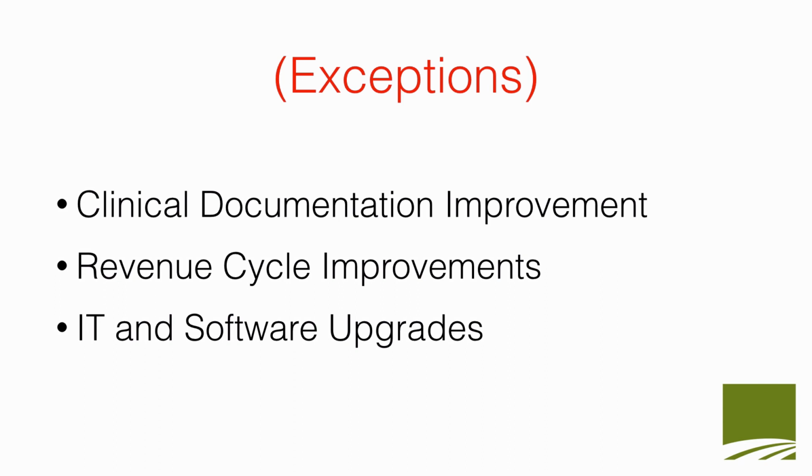The same goes with general revenue cycle improvements. If you're working on improving your revenue cycle, that will benefit both ICD-9 and ICD-10, so don't stop those improvements. Like clinical documentation improvement, I do not consider this part of the ICD-10 project scope. And finally, with IT and software updates, if you were installing an encoder or moving to computer-assisted coding software, that does not have to fall into the split project approach.